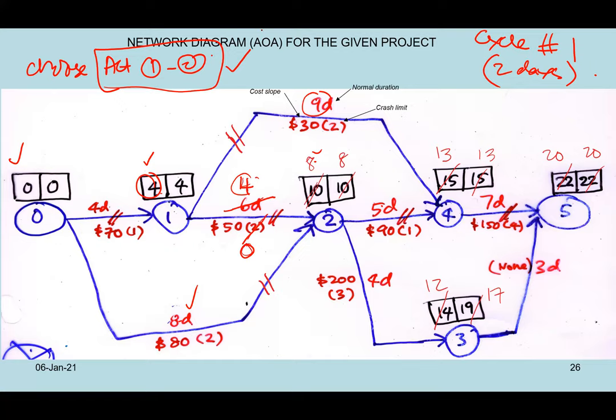So you complete the calculation, then you get 20. So now you manage to reduce the project by 20 days and still maintain the lowest possible increase in cost. Okay, so how much is the cost increase? The cost increase now is 50, remember 50 times 2 equivalent to 100 ringgit. That is the cost that you basically have to bear, 100 ringgit.